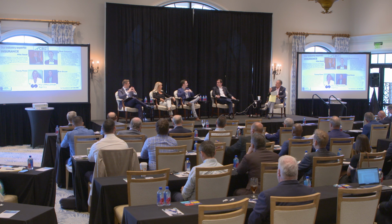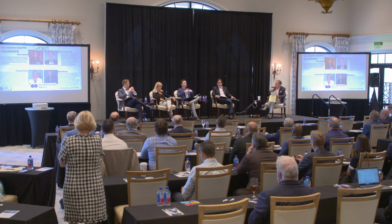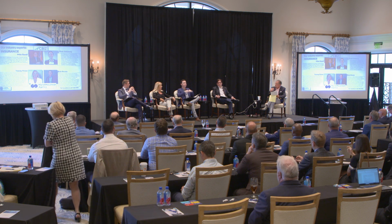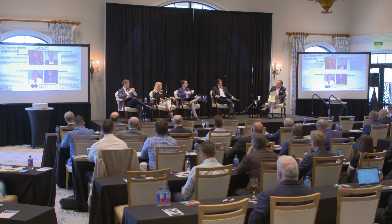And related to that is something we discussed last week, is viewing your builder's risk with how it pairs to your existing property coverage. We have some insurance companies that will not insure the existing structure during a renovation. So a few seasons ago, we had a club expanding their clubhouse, and their existing carrier would not insure the part that was not being renovated during the construction.